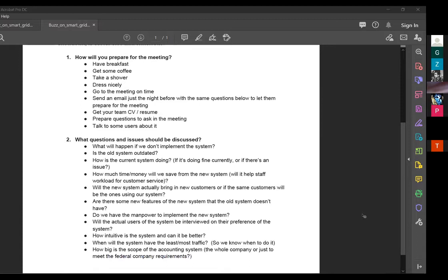Because in a large firm, typically in a corporation, there are IT work groups designated for each project, and they won't usually abandon one project for another entirely. But you could devote 80% of the staff to AIS and 20% to work on the CRS. That is also a possibility. It's not a one-or-all sort of thing.